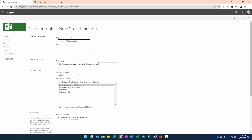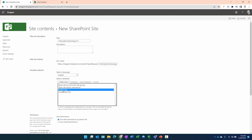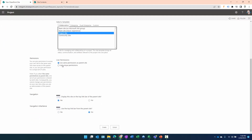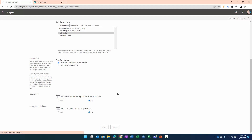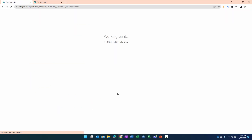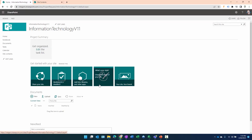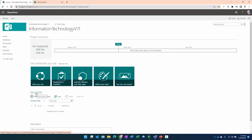We'll call this 'Information Technology v1' and put that in the URL as well. It's going to be a Project Site type. We want to use the same permissions as the parent site, and we do not want it displayed in the top link bar of the parent. Let's click Create. Once created, the only change we'll make here is to upload documents to the document library.